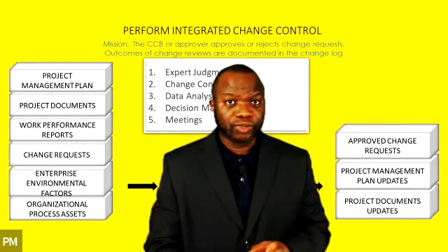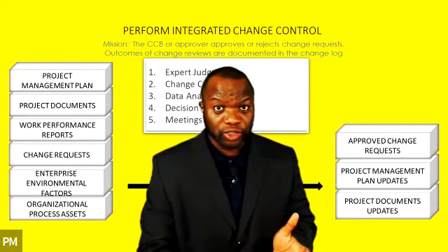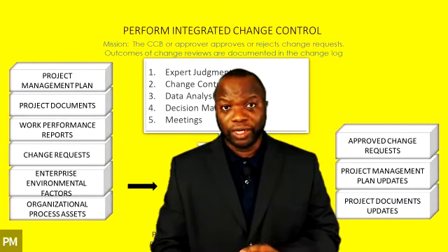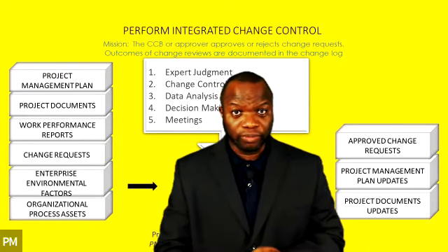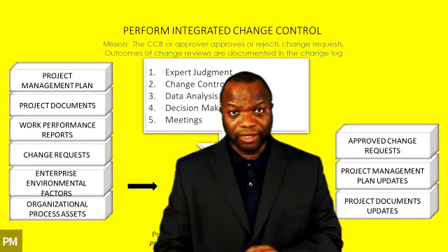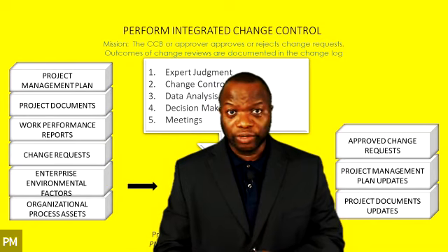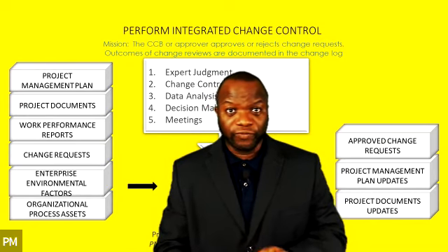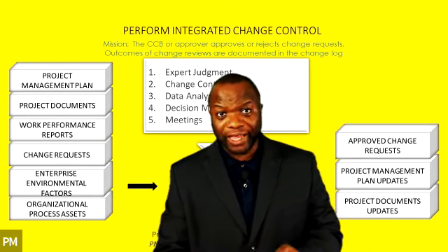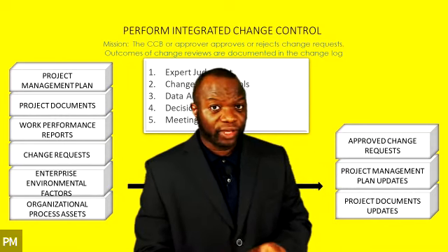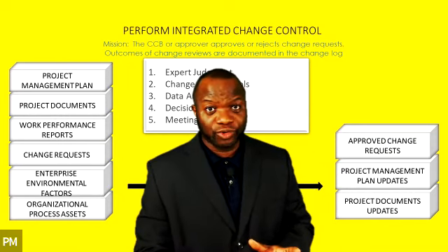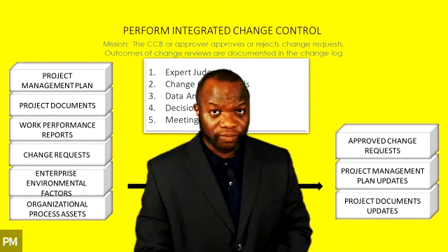So in instances where you may use version control, you need to agree on which documents are going to be version controlled tightly. That's what we're referring to here as the configuration management, the changes to features and functions and the tracking of those and the modifications to any artifacts like drawings. That's configuration management, all right?